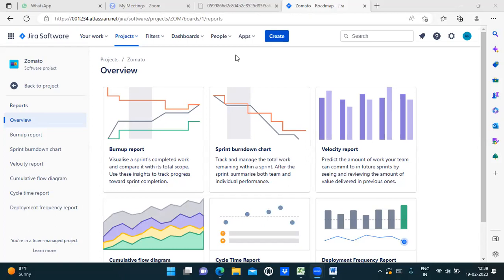So here, Priyanka, if you have dependencies, developers generally don't agree. That is there everywhere. So if that scenario is happening, what you do is talk to the tech head, tech lead. Tell him, sir, if you are talking about sprint one and there's a dependency on certain user stories, a simple thing you can do is attach the dependencies to the sprint user stories only.